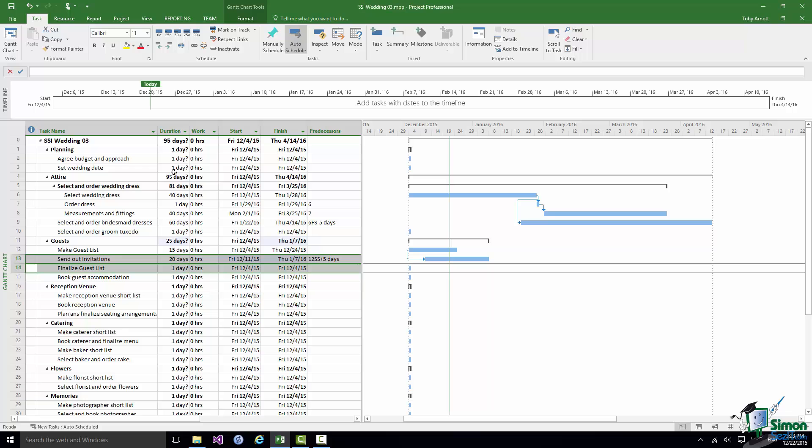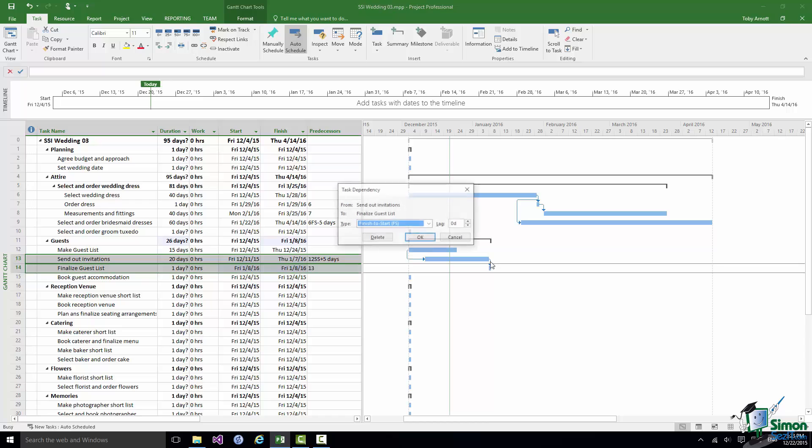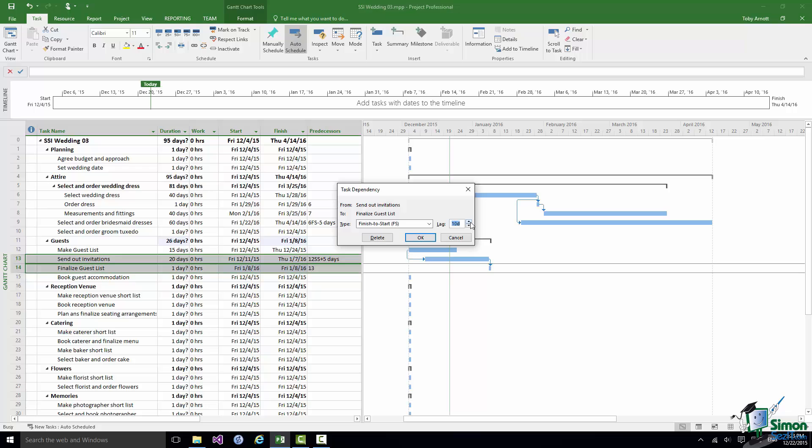So I'm going to create a link between those two and I'm going to put a lag of 15 days in. And then instead of saying that it's a Finish to Start link I'm going to say it's a Finish to Finish link.